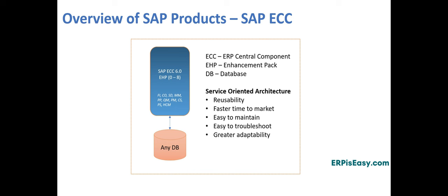Finally, support. The support team will usually provide 4 to 6 weeks of hypercare support. All defects will be prioritized and resolved as soon as possible during this time. When the hypercare period is over, the business as usual period begins and the regular support process will take effect.